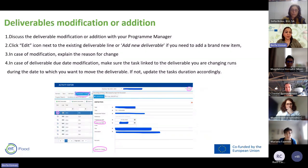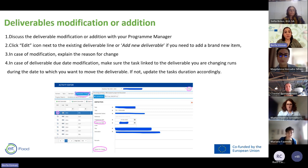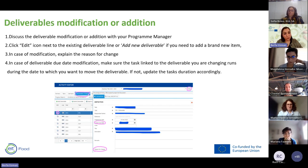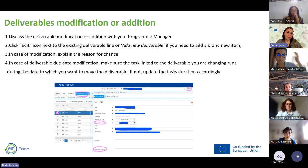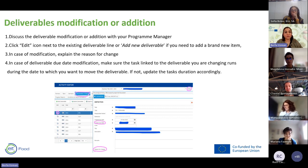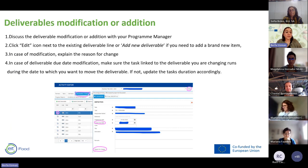Deliverables can also be modified or new ones added. First, discuss the modification or addition with your program manager. If agreed, go to Plaza and click the edit icon next to the existing deliverable, or go to the Deliverables/Output tab and add a new deliverable. If a modification is needed, explain the reason for the change. For deliverable due date modifications, ensure the tasks linked to the deliverable run during the new date — otherwise the system will give errors. If the task dates are wrong, update the task duration accordingly.